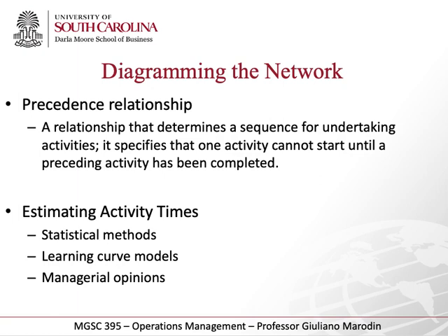But it is like when you're doing a course, for example, this course, Management Science 395, you're required to do Management Science 290, for example, so you can register. Then you can do 400 levels after this one. So you have activities that need to be done before the other one, and we have some estimated times as well, right? Sometimes it's going to be weeks, months, days, depending on the example. Okay.